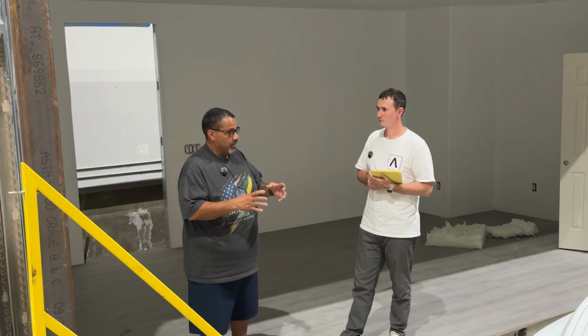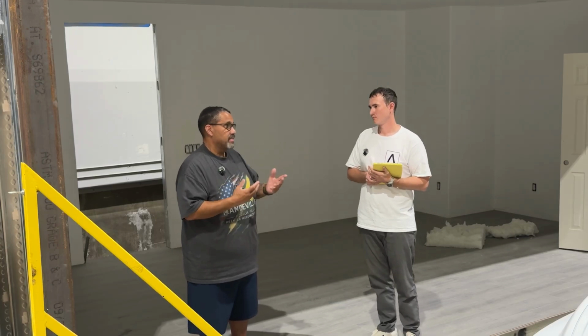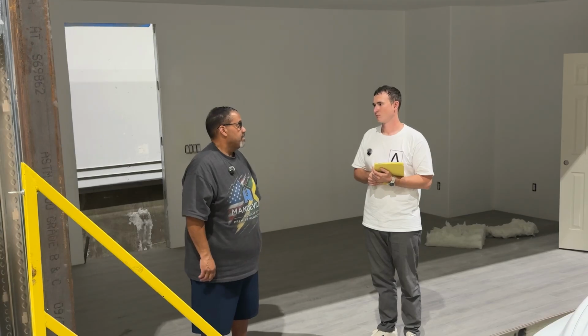So there are residual inspections after our building is landed. For example, like you're connecting electrical. So we give you the pathway and the panel, but you bring the conductor in and you connect it to the lugs in the panel. The city inspector will want to see that it's torqued down to the right torque spec. So that's one thing they do. The plumbing is connected properly. Your drain is connected properly. If you have gas, the gas line's connected properly. So all those the city inspector will want to see.